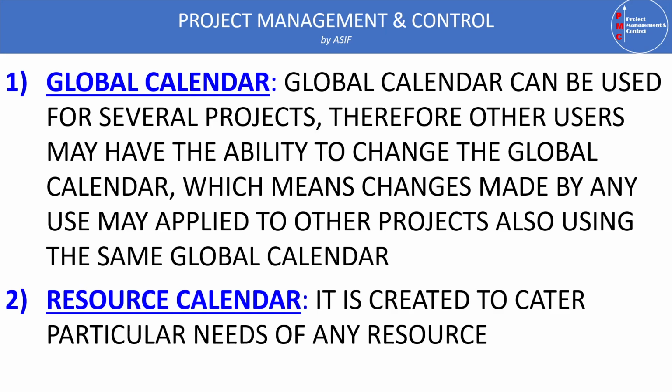Because of this, we get unexpected and unusual results, and these results may sometimes be noticed by the client and consultant, who object and ask for the reason why it is like this. So the global calendar can also be one of the causes. Keep this in mind: when you get unexpected results for durations or dates, the main cause may be a conflict in the calendars.